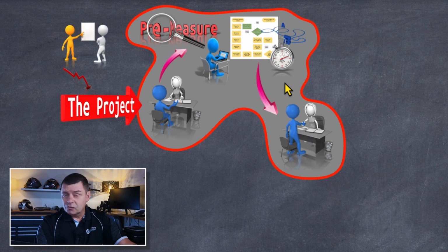So the way it would work is we'd bring a team together, and if it's more lean oriented, then this is the general pathway that we would follow. We'd bring the team together, do some sort of team consolidation or team alignment activity. Then we might lay out the process flow, extract an activity flow chart from the people in that group, and the people in that group should be the people who actually do the work, at least those people. There might be additional people who can contribute to this, but it's that group of people who can now give you the information to document a process. Because you've seen it in the pre-measuring phase, the project leader is in a position to be able to facilitate that process more accurately. They know what to ask.